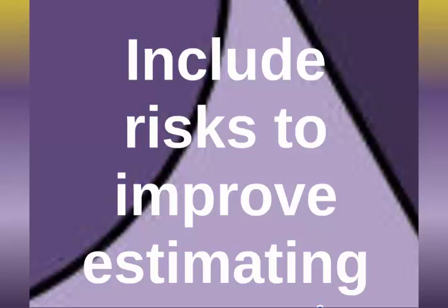Risks should always be considered in relation to a project plan. Any plan will have some level of assumed risk within the estimates of duration and cost. Project managers should, however, include risk-based contingencies within schedules and cost estimates. These should then be included within forecast to complete data on an ongoing basis.